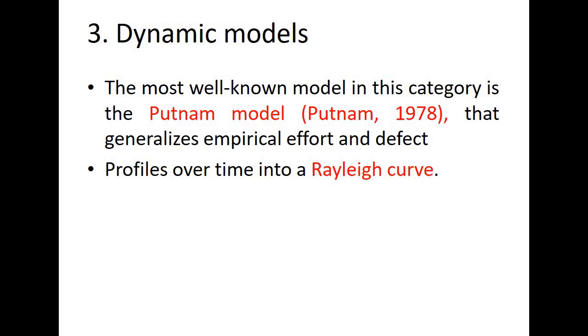It can be in the form of effort, it can be in the form of size, like effort in case of function point analysis, size in case of your LOCs or KLOCs, and then we fit a curve to the data. Further future effort estimates are made by providing the size and calculating the associated effort using the equation which fit the original data.